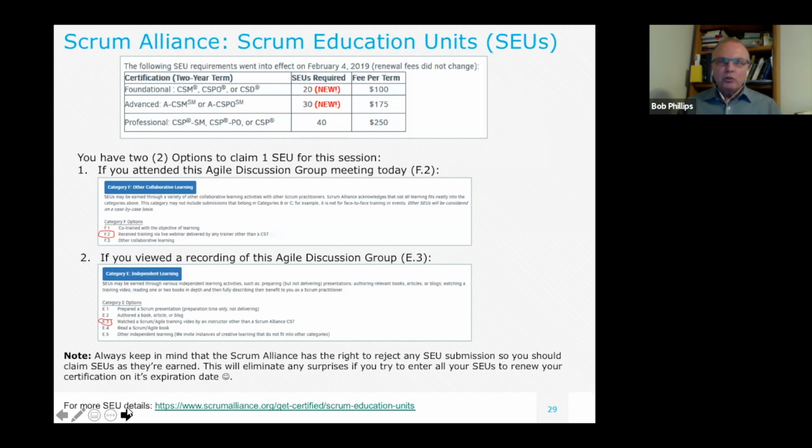And it sounds like you're doing the conversion already in the background, but yes, you might want to get the team going. To me, that's a way to get a team started. You do t-shirt sizes, but then you start saying, okay, instead of small, how about we make that 1? Why don't we use 1 as small? And basically work through it that way so that they get the idea of using the Fibonacci sequence.